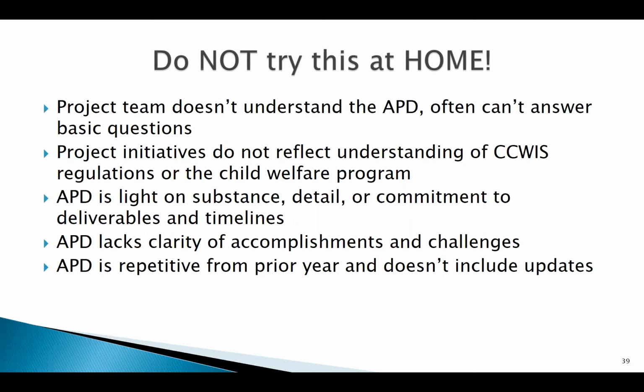This next one too, we have APDs that really don't commit to anything. They just talk very at a high level about things that are going to happen or they would like to happen, but there's no timelines or any steps, or method in terms of resources for how you're going to achieve what you've told us you're going to do. That's another red flag.